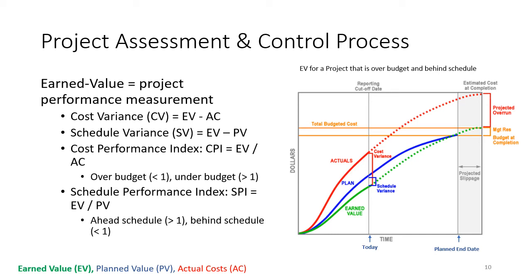One way of reporting this concisely is the cost performance index, or CPI, which is earned value divided by actual cost. You are over budget if CPI is less than one and under budget if it is greater than one. Likewise, the schedule performance index, or SPI, is earned value divided by planned value — you are ahead of schedule if that ratio is greater than one and behind schedule if it is less than one. These are the main points about how to use earned value to assess and control project performance.